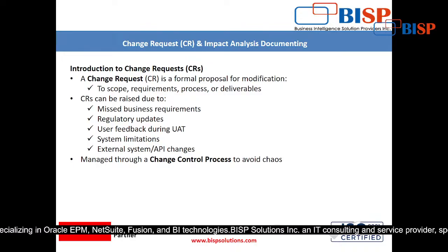So at that time our boss, who was a civil engineer, said that RERA has made some modifications in their compliance or the regulations, right? So kindly make this update. Now this thing was included in the change request. When we froze the BRD, at that time there were no such changes, but when we came up to the halfway of the project, at that time they received some modifications in RERA compliances. So definitely the boss will say that okay, please accommodate.